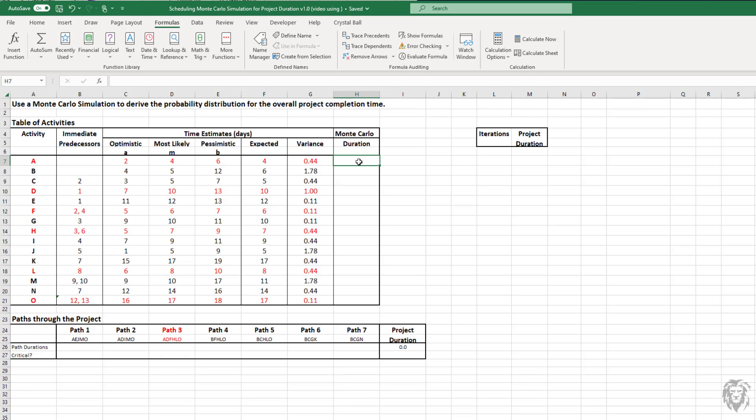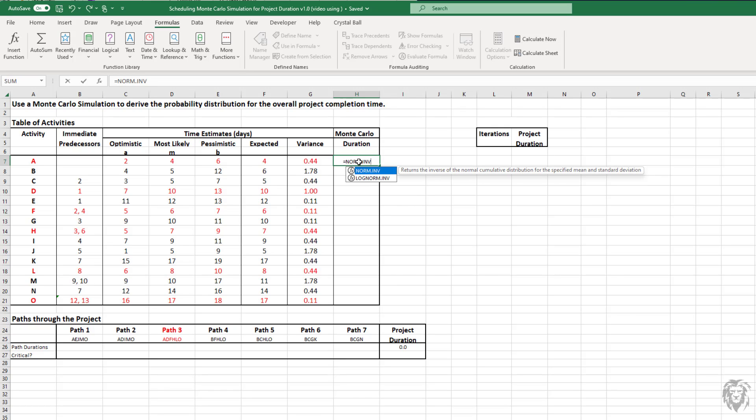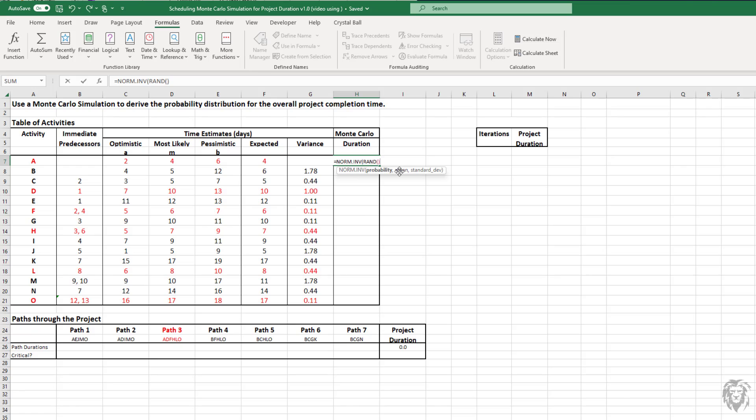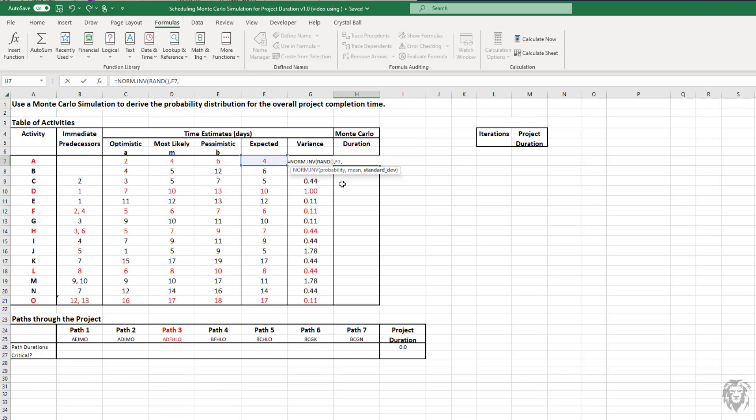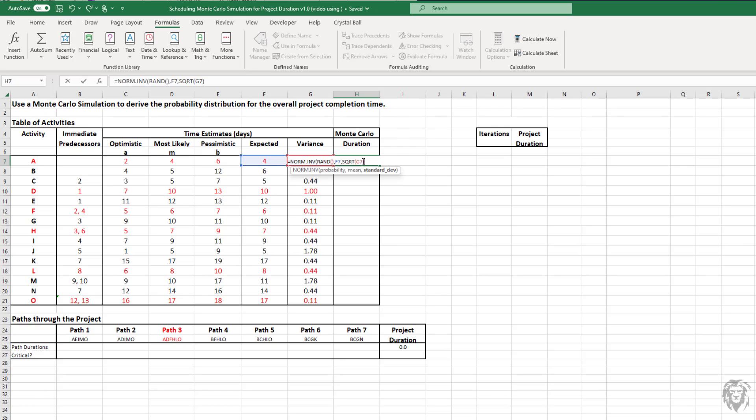We're going to be using the norm inverse function. So equals norm inverse. You can look up the quick help that comes with it. The first thing we need is that probability. This is where we're going to use our random number generator, which will, for any new calculation on the spreadsheet, generate a new random number from 0 to 1. Then we need our mean, which is our expected value. And then we need our standard deviation. We have the variance, so to get the standard deviation, we need the square root of our variance. And that should be everything we need.